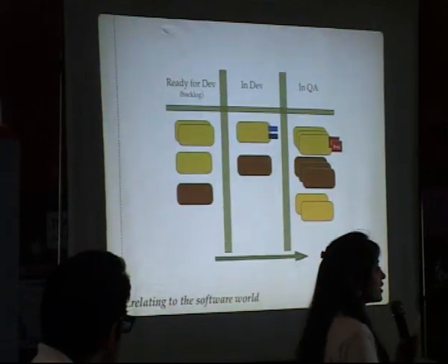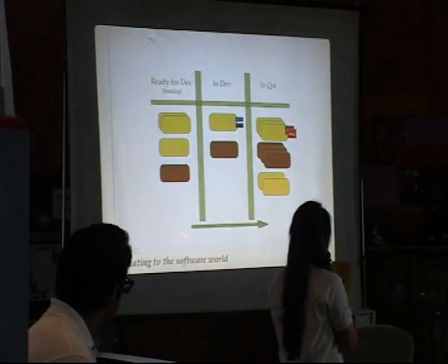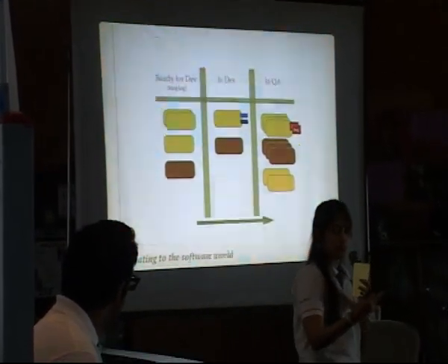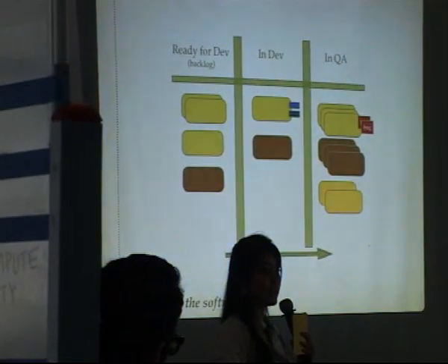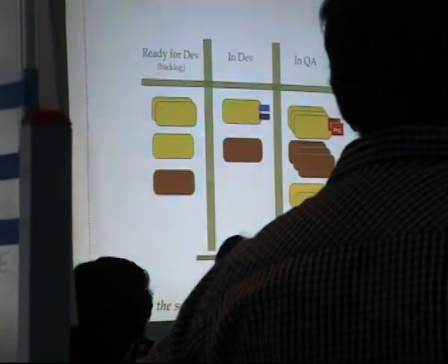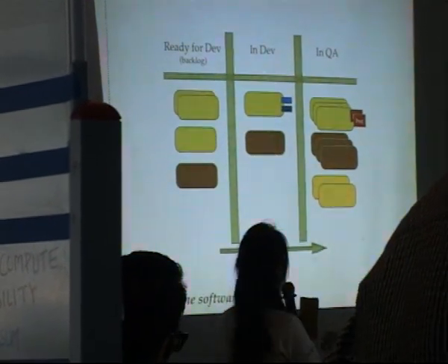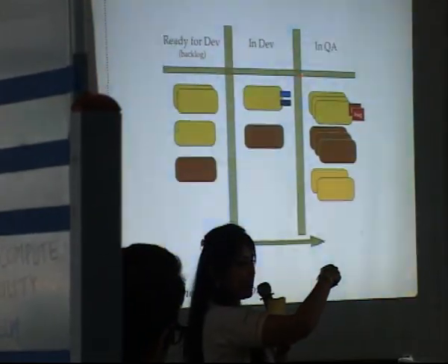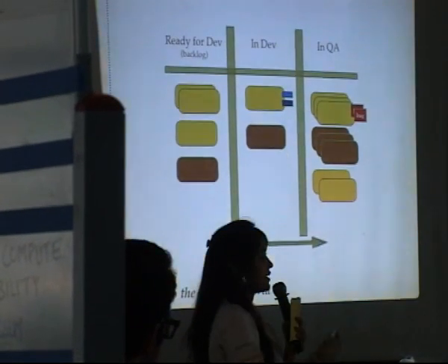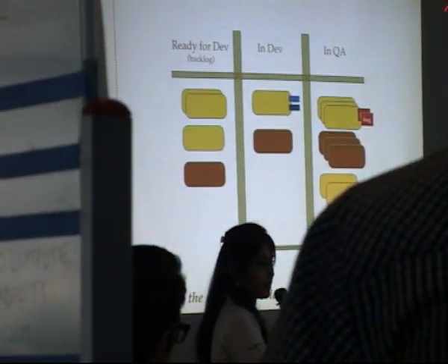This is typically a storyboard. If you walked around the office, for every single project this is how we represent status, or what the project currently is at. So we keep some backlog ready, which is ready for dev. This is typically analyzed and perfectly ready, with all specifications written out. This is in dev. Once you have a dev resource free, he goes over to the backlog and picks up the highest priority. This is always arranged by priority, highest priority on top. He puts it in the queue and continues working on it, and once he's done, he pushes it into the QA queue.